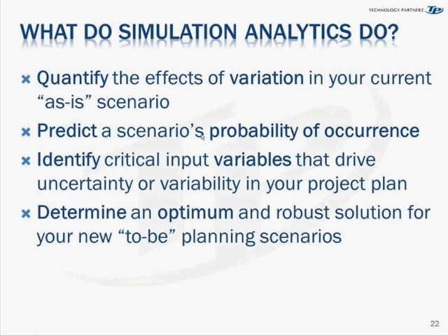What do simulation analytics do? So why are we doing this? We use PRA because we want to quantify the effects of variation in our current as-is scenario. So we want to figure out if we apply uncertainty, what does it do? Then if we need to make some targets, delivery dates or costs and so on, we want to figure out what are the odds of us making those targets based on the uncertainty we have.